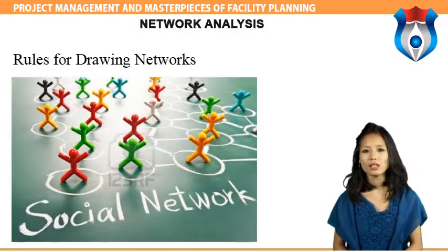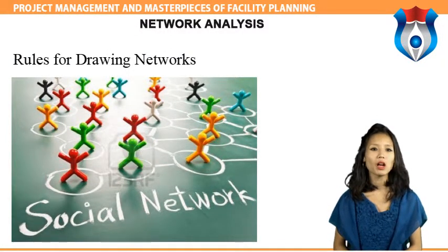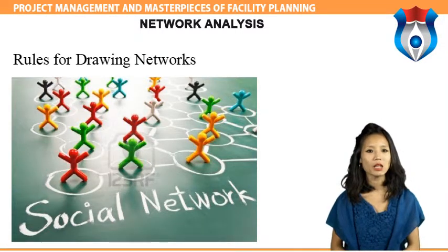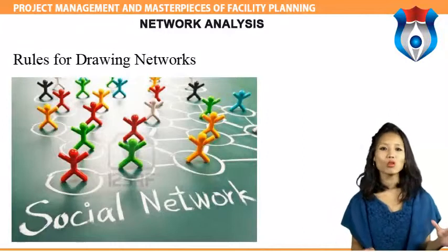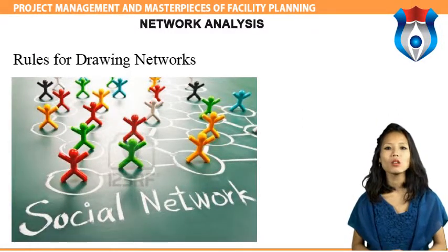However, an activity must not share the same tail event and the same head event with any other activities. No activity can start until its tail event is reached. An event is not complete until all activities leading into it are complete. This is an important rule and invariably has to be applied in examination questions.